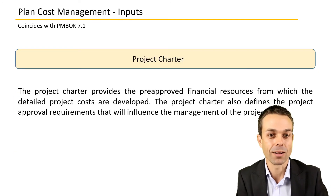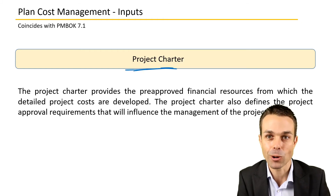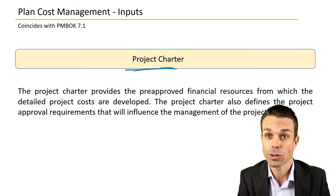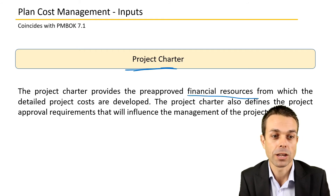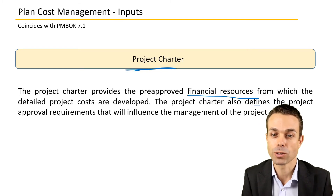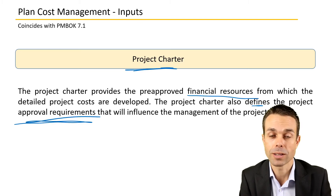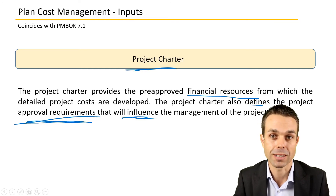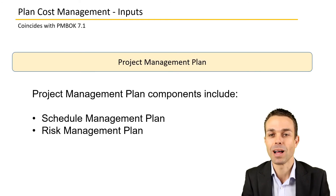The project charter is the document that initiates and kicks off our project, providing a high-level view including a high-level view of cost. It provides the pre-approved financial resources from which the detailed project costs can be developed. The project charter also defines the project approval requirements — who is the project sponsor, who are the stakeholders, and who are the people that will influence the management of project costs going forward — essentially, who is paying for this project.